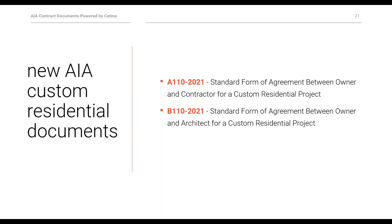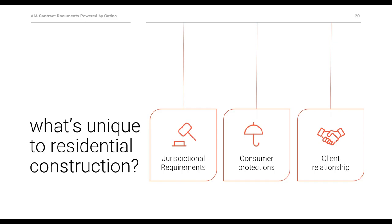What is unique to residential contracts is jurisdictional requirements — laws that protect consumers from unscrupulous residential contractors. Most specific to residential construction is the client and how they understand a residential project. The client is emotionally invested in their home and is probably not knowledgeable about the construction process or terminology — for example, what is an allowance? The architect and builder may have to do a lot of explaining, managing of expectations, and work hard to keep relationships going smoothly.